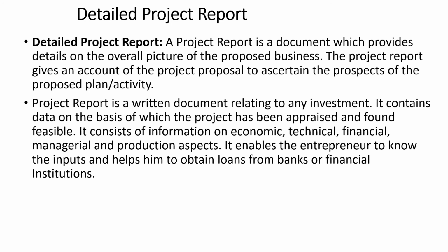The project report contains detailed information about land and building required, manufacturing capacity per annum, manufacturing processes, machine and equipment along with their prices and specifications, requirement of raw materials, requirements of power and water, manpower needs, marketing cost of the project, production, financial analysis, and economic viability of the project.